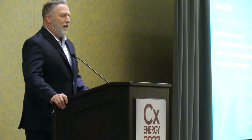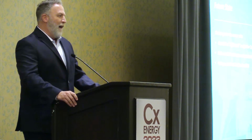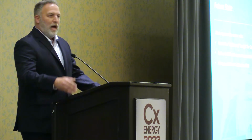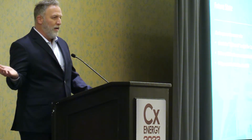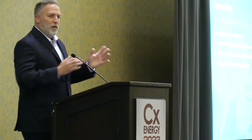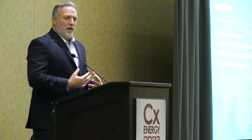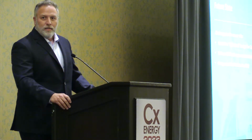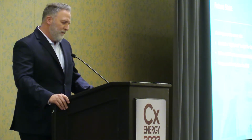We also have to align many internal stakeholders for a budget. What does that budget look like? Is it half of 1% or is it 2% of overall construction costs? That has to align with the scope of work that we're trying to write, but it also has to include not just our CXA fee, but the contractors, the engineers of record, the vendors, right? These are all things we all know. You can't go out to do your work if you don't have somebody to support you. And that's our job as an owner to align all those stakeholders together so that when we ask for these capital spending costs, they're included. It makes a lot of the problems go away as soon as people start getting paid.